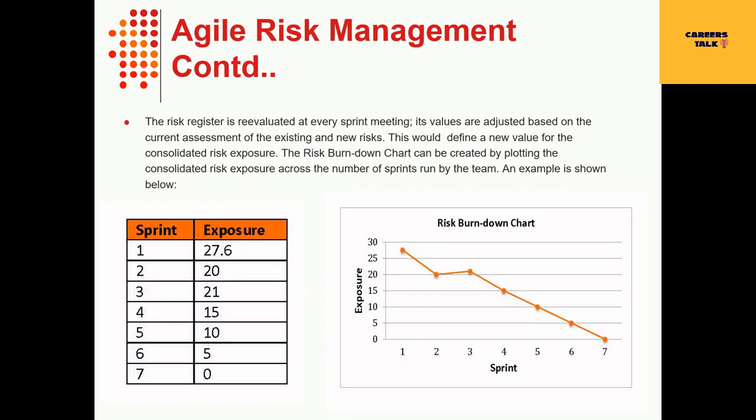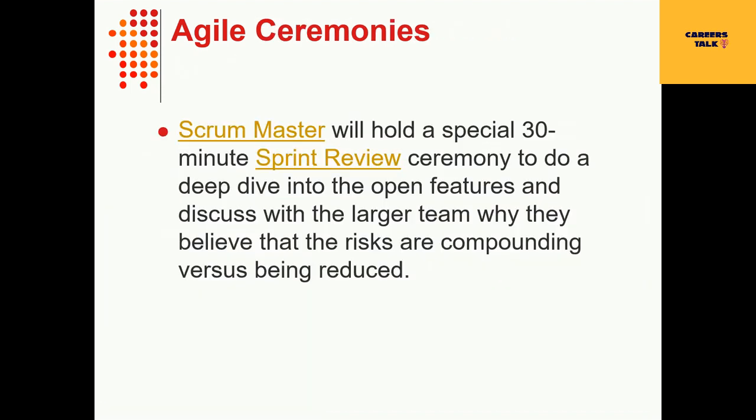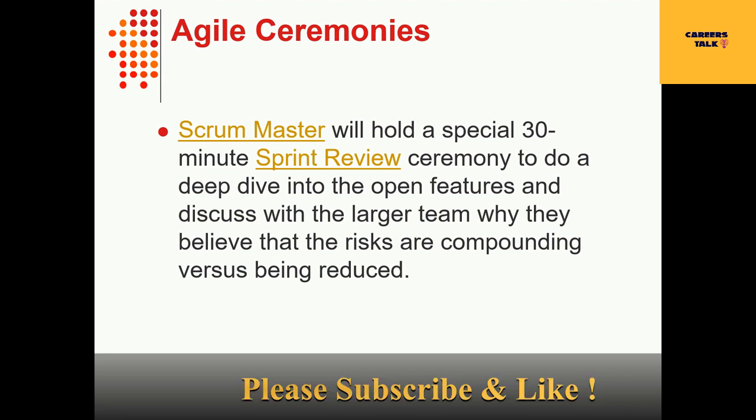The risk register is re-evaluated at every sprint meeting. Its values are adjusted based on the current assessment of existing and new risks. This defines a new value for the consolidated risk exposure. The risk burndown chart can be created by plotting the consolidated risk exposure across the number of sprints run by the team.